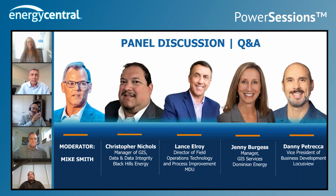Yeah. So Lance, you almost described exactly what one of our other customers at Puget Sound Energy does. They view the raw Locus View preliminary data that comes in real time through their GIS for awareness and productivity, but more importantly for safety. But then there's a parallel workflow that says, here, that preliminary data is here, and I know if I dig here, I'm going to encounter it, but it's still going to go through a QA/QC workflow to make it that future system of record data.